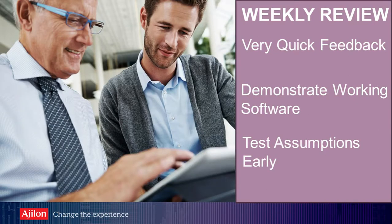So the weekly review, this happens at the end of each week. The product owners and businesses really love this because we're able to demonstrate working software, not how many hours we've burnt down on the chart, but actually tangible progress. We use this to test our assumptions early, make sure we're building the right thing, get a usability review, and again, being totally transparent, this is what we have achieved in this week.